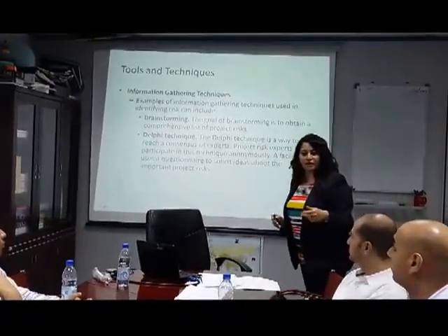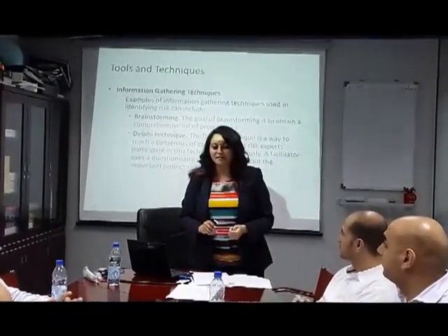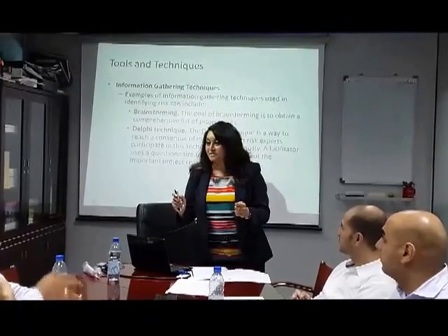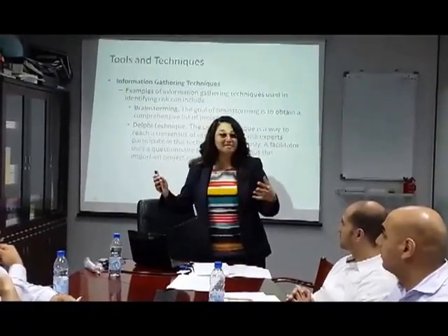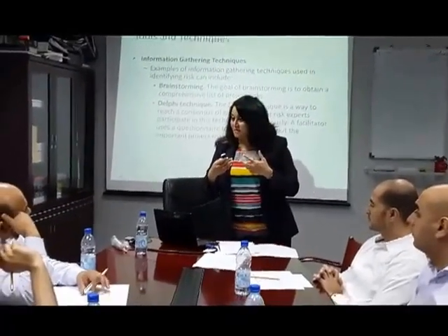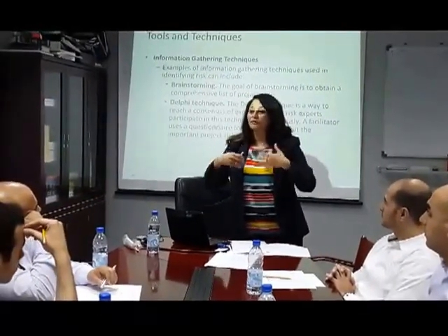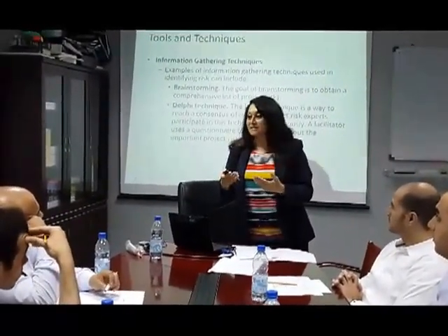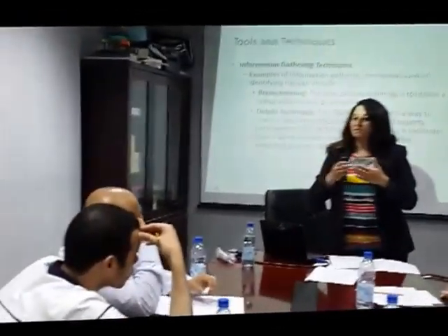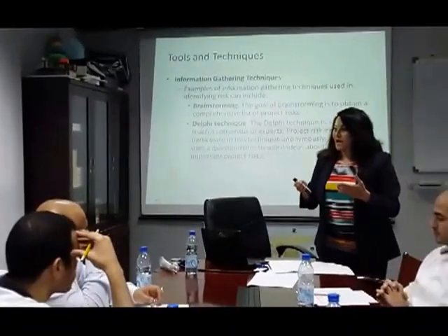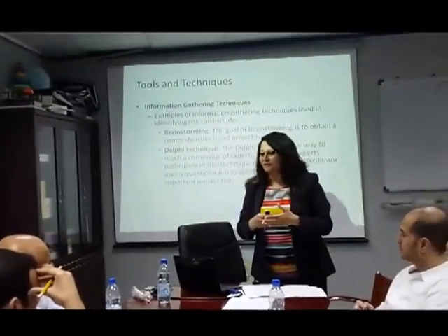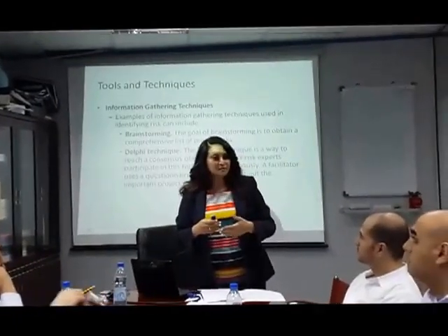Now, if I tell you, okay guys, and we're going to do an activity later on like this, we want to identify risks for this project. So we sit and we brainstorm. Everyone will contribute their ideas and give us the risks that you think our project could be exposed to. So this is brainstorming. And then after we gather all the risks, we can categorize them.